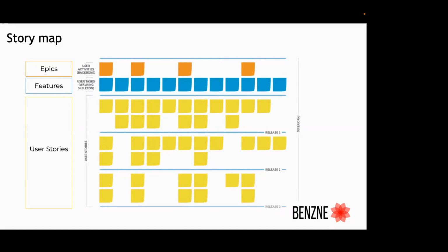It's a 3-step journey where we first identify the user journey and the phases of the user journey, so that each and every stage or phase in a user journey becomes our epics. The next phase is to drill down into each and every phase. Now that we have identified the epics, the next phase in the discovery session is to identify what capabilities under that step or phase of a user journey we are looking at providing. So that will give you the list of features, which is nothing but the capabilities under that epic.